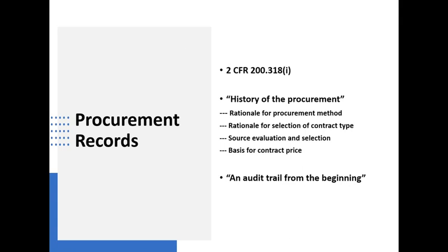What you do is hold all the acceptable offers up against one another and establish how you selected the successful contractor there. On the other hand, if you are dealing with a contract where you solicited the contractor to break out the individual elements of cost that go into the bottom line price, then how did you assess those costs?